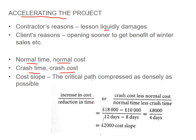You can calculate your cost slope by taking your increase in cost over your reduction in time — that is, crash cost less normal cost gives you the increased cost, and normal time less crash time gives you the reduction in time.